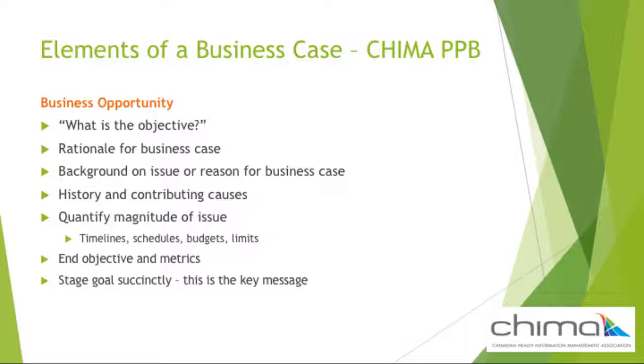For example, people not being productive when working on their PCs in the morning is not a business opportunity. The cause of the issue should be identified. So in this case, the PCs are so old that it takes them 40 minutes to boot up in the morning. Changing the PCs out to newer models to better support the staff is a business opportunity.